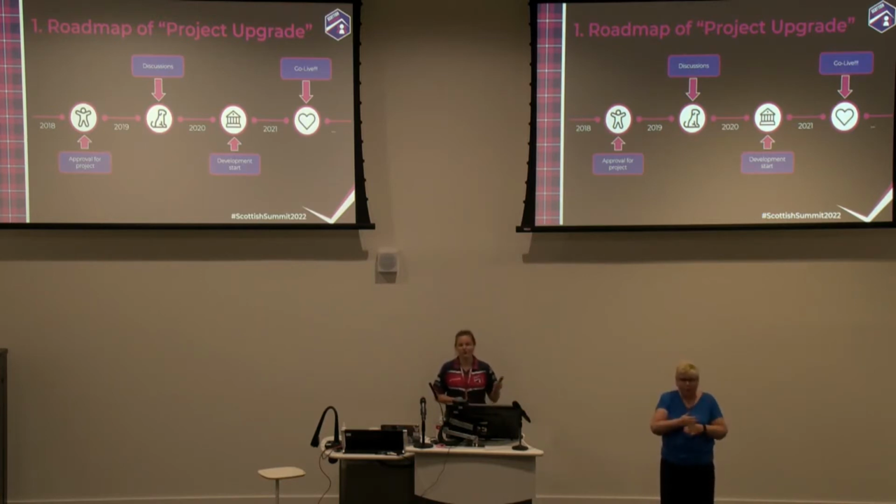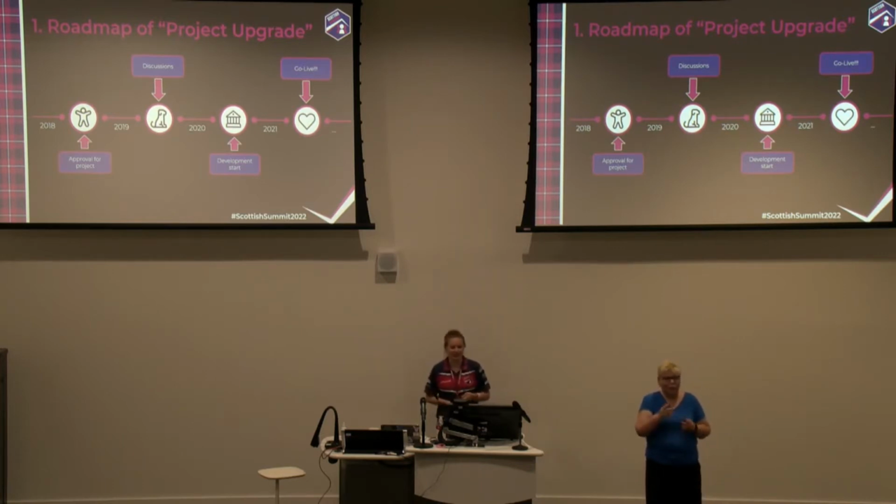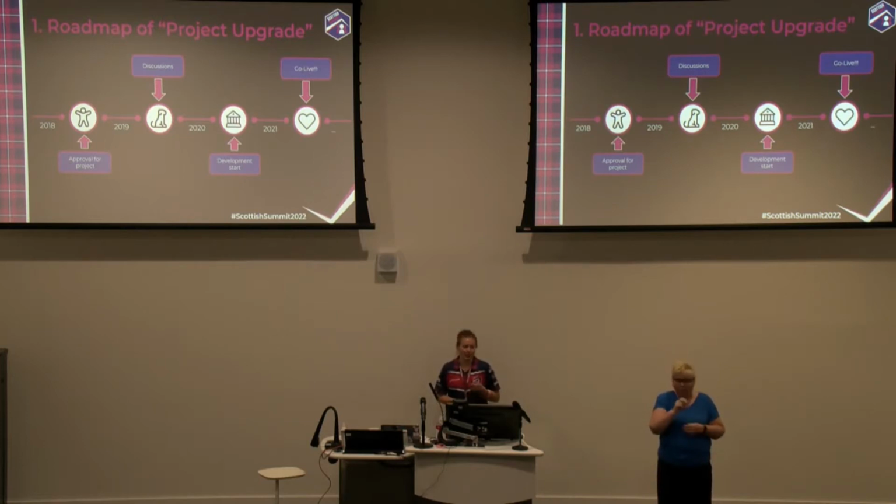The problem here was people were going different directions, people were adding things to the project, no one was taking charge, and in the end, the scope that we started with, that was a dream scope that we had in the start. We ended up with 800 more things in the scope. Because there's some small changes, so just add it on top. Nothing's going to change. So that changed a lot. Let's say we first planned the go live in 2020, so we basically just moved the go live date a whole year. And to say that the bosses were not happy is a whole other level.